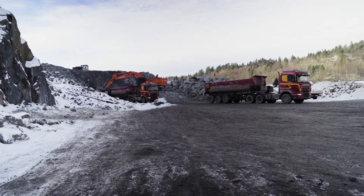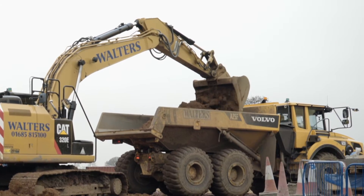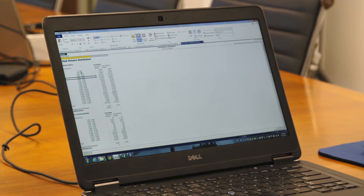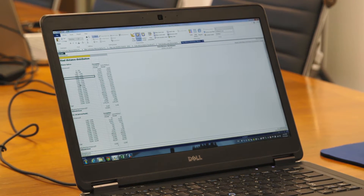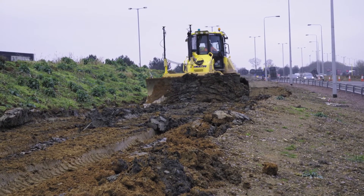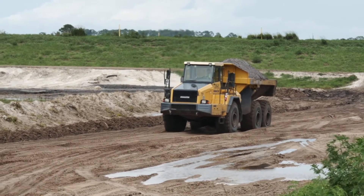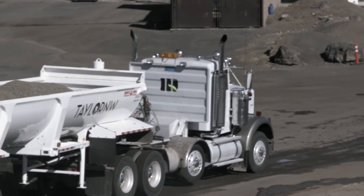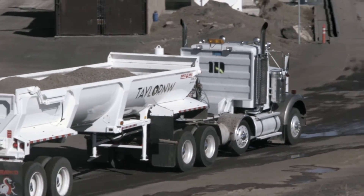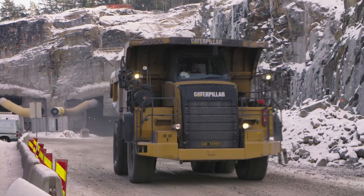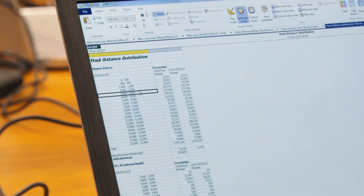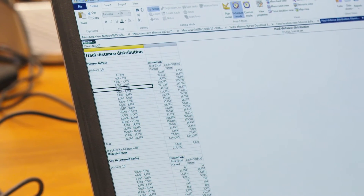We can easily see what kind of equipment we have to use to make the jobs right. I can go through the haul distance distribution and see all my different hauls. If you have short hauls less than two or three hundred feet, that's probably a doze of material. Over three thousand feet, you put it in an articulated truck; over five thousand feet, you have to put it on a road truck or rigid truck. By looking at Dynarode's earthwork balances and all the reports, I can tell exactly what type of equipment I'm going to need.